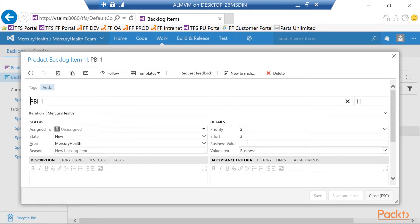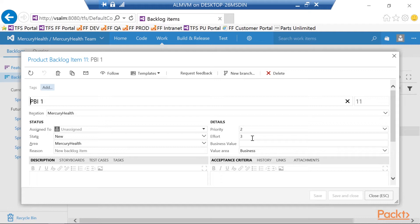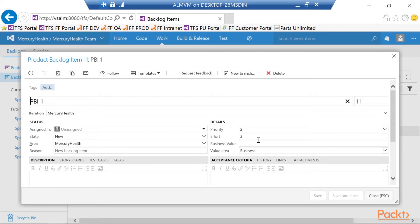Again, that can be a Fibonacci sequence. It could be a number related to hours. So for example, one point, one effort point equals four hours of work. Or two effort points equal eight hours of work. Again, it's all up to the company to decide what's working, or the team actually, to decide what's going to be best for our team to effort these and make sure that we understand the size of what we're going to create here.